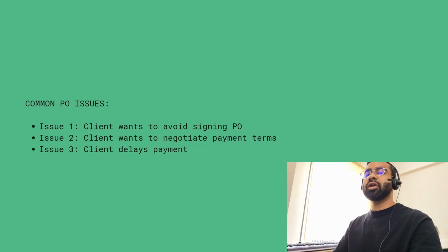If payment is delayed beyond 60 days, we may need to pause work until the account is clear. Let me know how I can help expedite this. Thanks. Usually, this resolves within a few days. If not, escalate this to your financial team. And do not continue work if you are significantly past due. That's how you get burned.